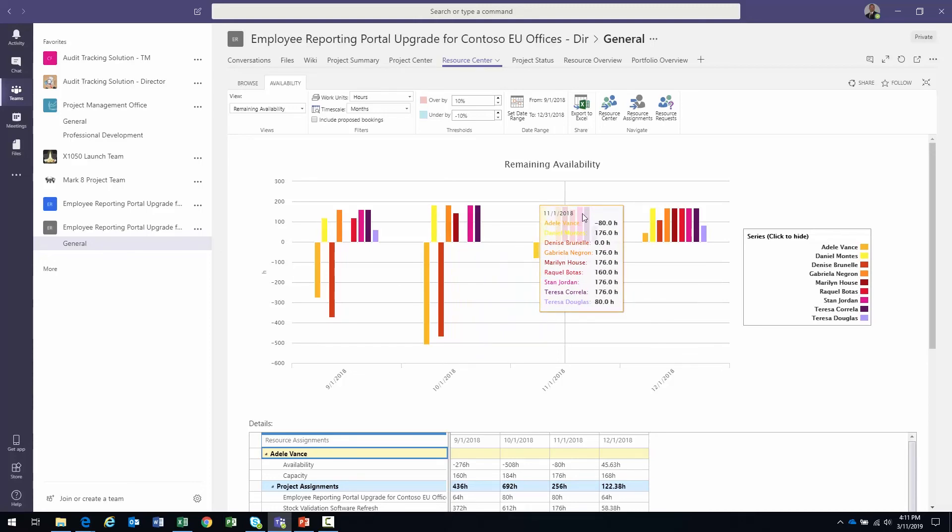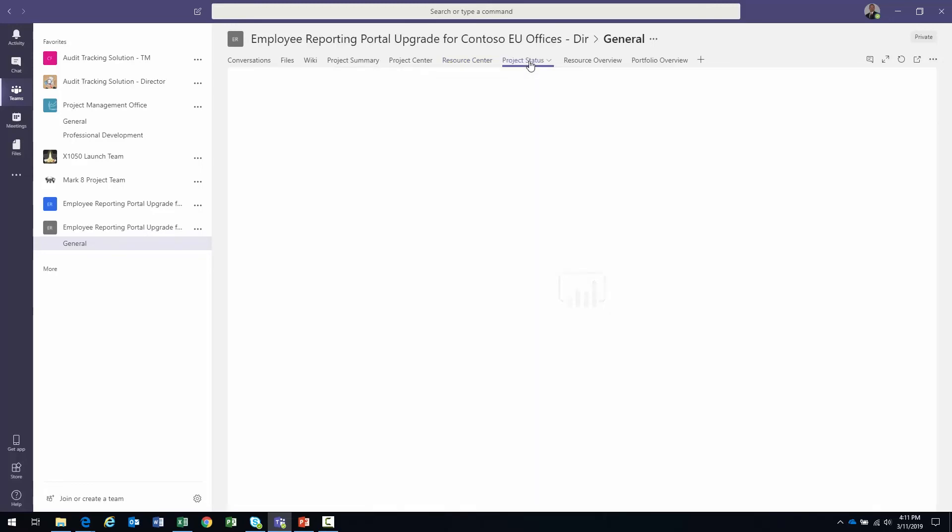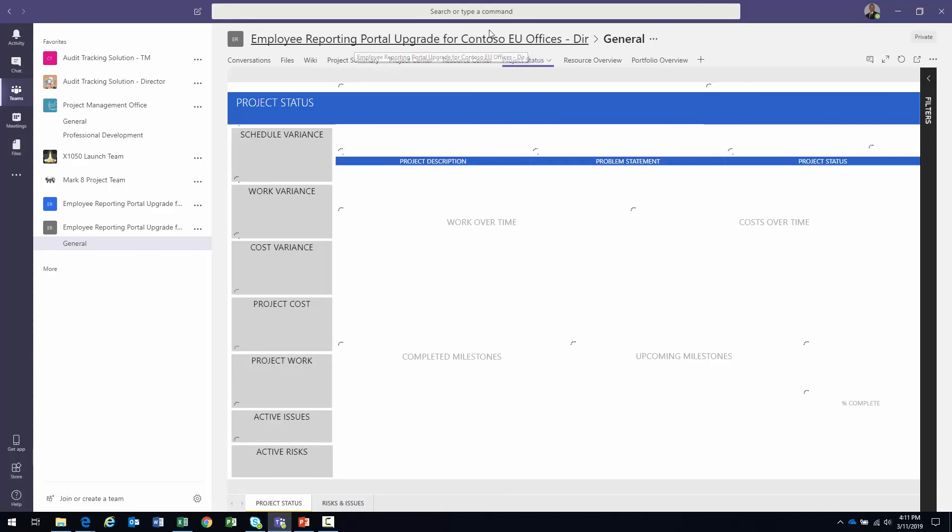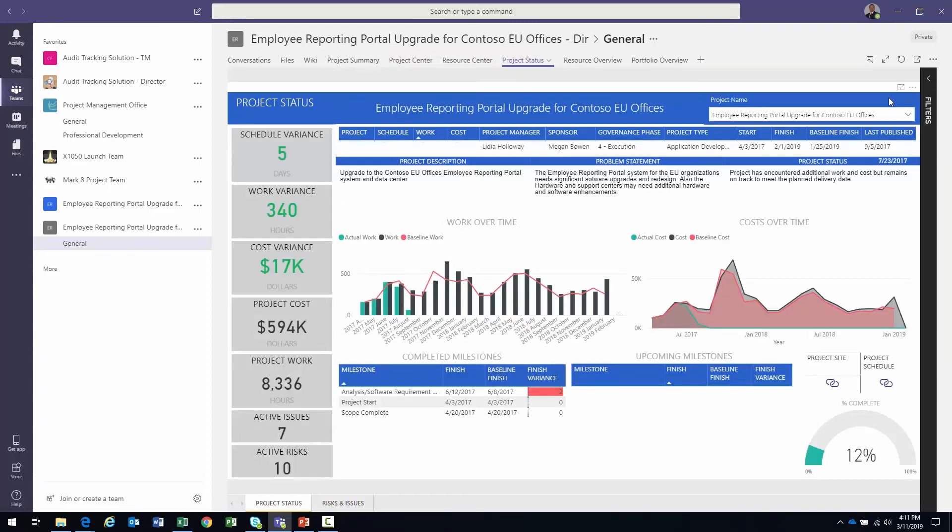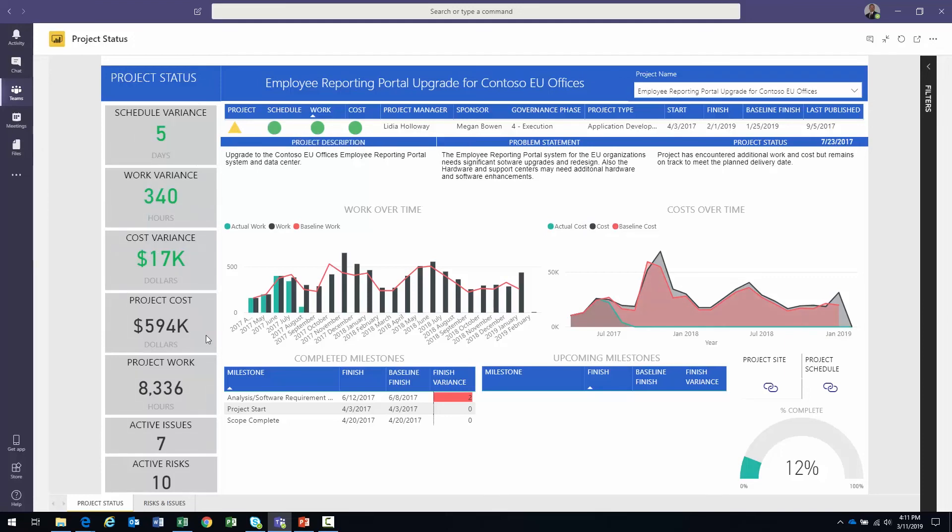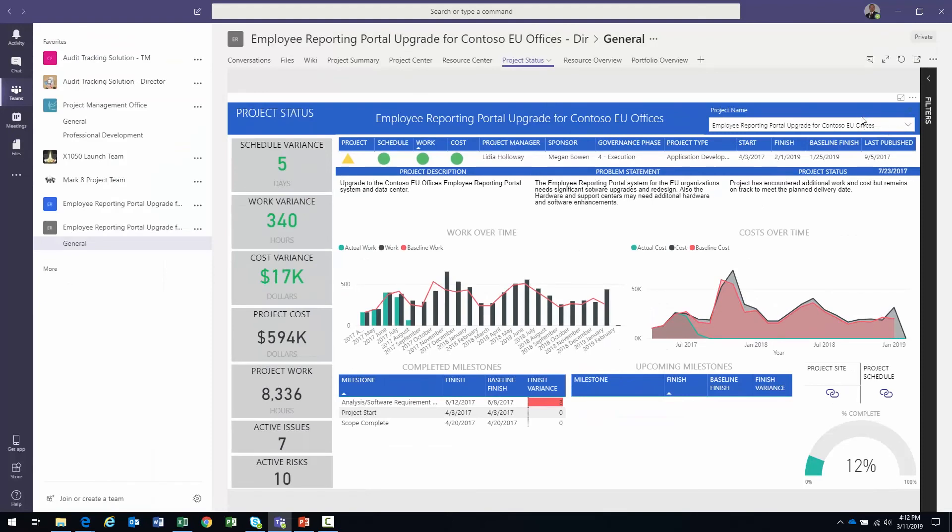When it comes to the point when I want to see maybe more robust reported type of information or reporting information, I might want to actually pull in some Power BI based reports as well. For instance, I might want to report, see a status report for this particular project that I'm querying on. And this is a Power BI based status report for the employee reporting portal upgrade for Contoso. There it is within the Teams environment. And again, I can click this expand tab. That'll basically open the report. Wide screens that will give me all the real estate to be able to view this information. I have my KPIs, schedule work cost variances. I have the green indicators up here. You can see the details, the tiles showing the different metrics over here to the lower left. We have the project attributes up here. We have some more attribution, project status, statement, description, work and cost over time, and you're completing upcoming milestones. So I get a lot for the project status.